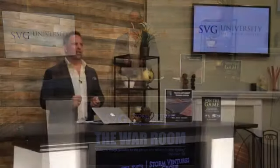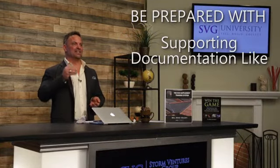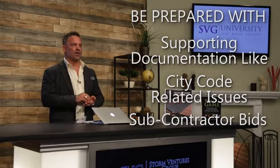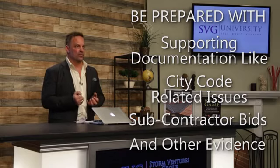Also remember, supplementing starts at the adjustment itself. Work closely with that first field adjuster and be prepared with supporting documentation of things like city code related issues, subcontractor bids for specialty work, and other evidence needed to get the claim approved and to get your pricing approved. Be aware that sometimes the first field adjuster that comes out is only allowed to buy certain items and certain dollar amounts. He or she is guided oftentimes by a set of rules, and each insurance company is unique.